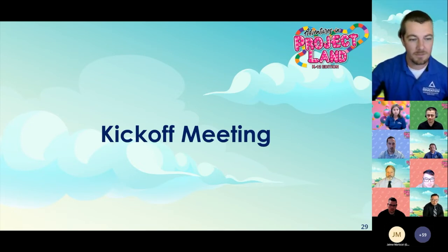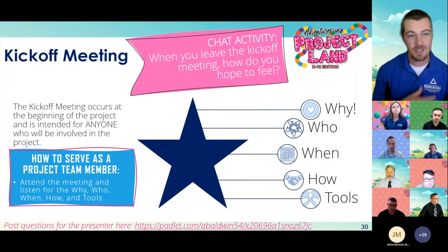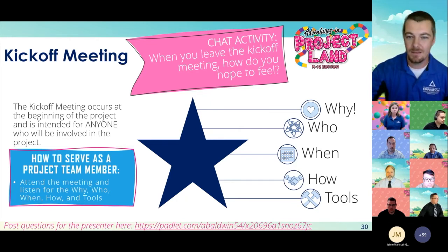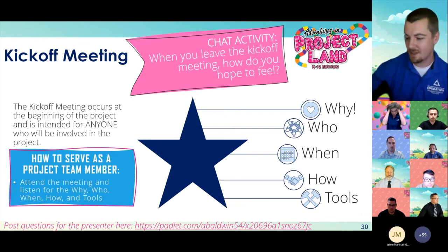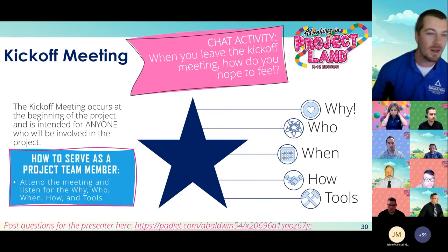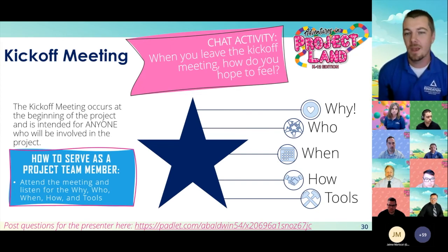The kickoff meeting occurs at the beginning of the project. Once the project's authorized and we have a reasonable plan in place, this is where the kickoff meeting happens. It's intended for anyone that's going to be involved in the project. So you might not include the actual clients, the customers. If your project is for students and parents, you might not include them in the kickoff, or you might. Depends on the exact nature. But the real point is the team, the sponsors, the people that are close to the project, to just kick it off, get it started.